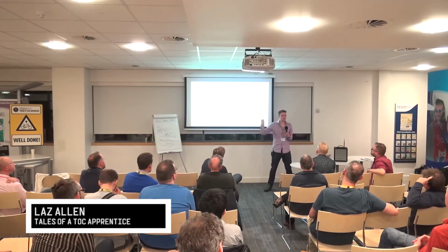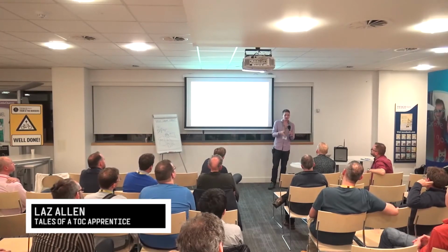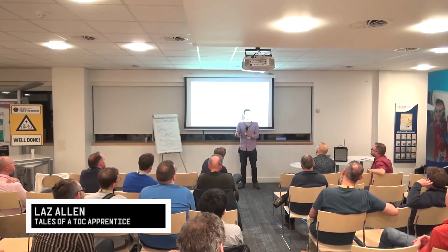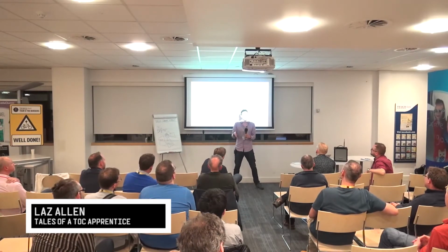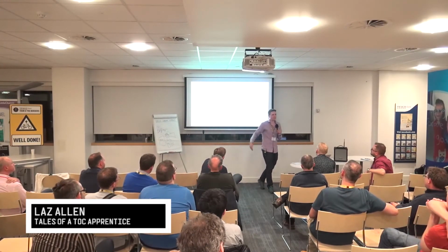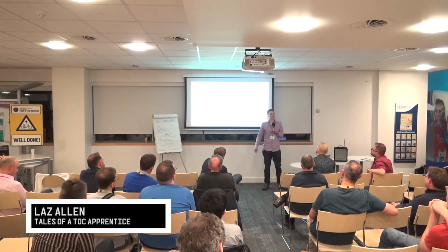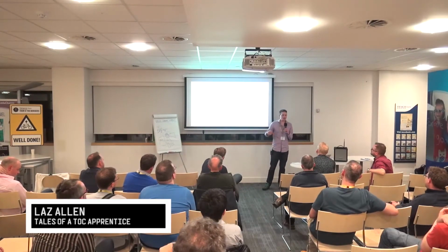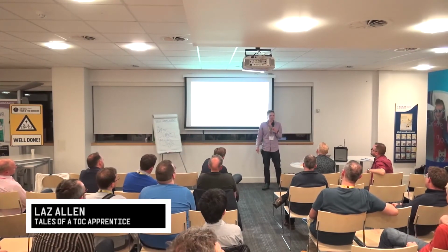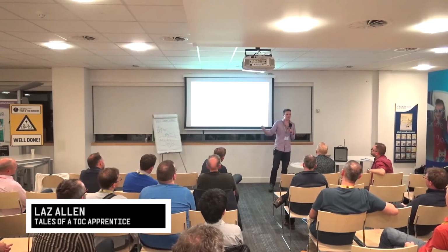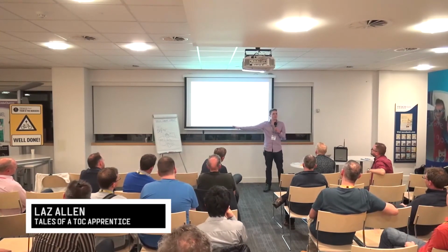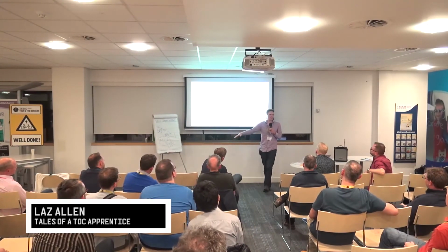One of the slides I don't have on here, because it's on my longer deck, is a Kanban board. If you have a Kanban board and a larger number of skills, with an analyst in your team, a developer, and some testers, and you've got a ready for dev column and a ready for test column between your dev and test columns, and you find that there's always a whole pile of stuff in your ready for test column, then guess where your constraint is, right? So when you have your retrospective, if you spend any time talking about how to improve the development process, you're not going to have any impact, because your constraint is in test. Vice versa, if it's in the ready for dev column, don't bother looking at how you can improve the test process, because that's not where the constraint is.